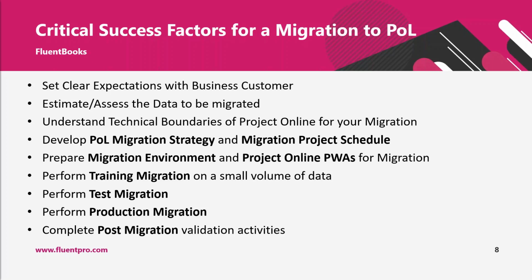Other factors that would make your migration successful are developing a migration strategy, like understanding what data you will be moving to Project Online, like if you need to split the data or if you will be migrating it all together, and developing a migration project schedule, identifying tasks that would need to be done, who will be responsible, and how long it would take to complete specific tasks.